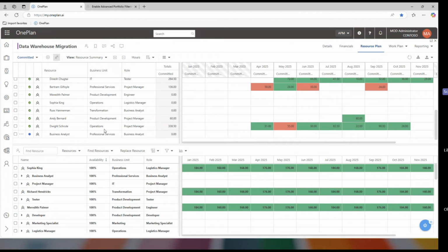It's down here. I'm going to do my top-down resource forecast, either in hours like this, where I say I'm going to need this person 50 hours for the next few months, or you can allocate across the whole year, or you can even change this to do your allocation in percentage or full-time equivalent, so one represents one person. Using this top-down resource management, you can start with this.